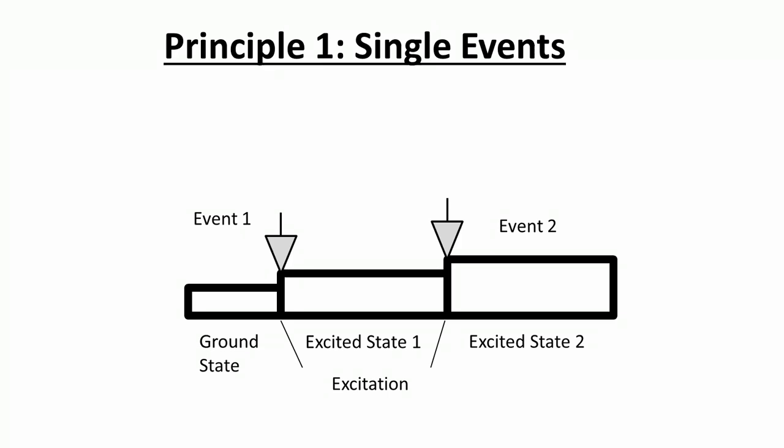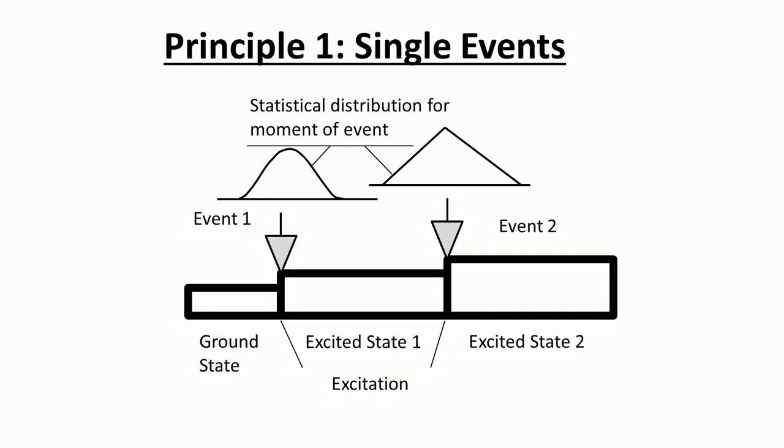The actual moment of an event is probabilistic. Most events can occur with a certain probability anytime during the course of that activity. It is most important to know the moment of a scheduled risk event, potentially causing a restart of the activity or launching another activity. Events can be local, affecting a particular task, or global, affecting all tasks.